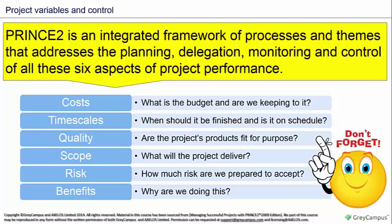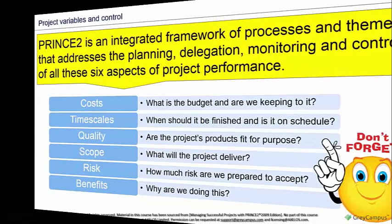PRINCE2 is an integrated framework of processes and themes that addresses the planning, delegation, monitoring, and control of all six aspects of project performance: cost, timescale, quality, scope, risk, and benefits. That's a list you need to remember.